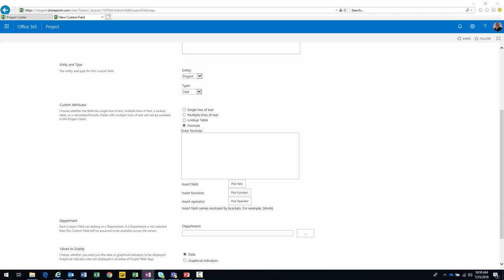And rather than you watching me type this, we're going to paste this in. Okay. All right. So let's talk about this formula, right? Notice what it does. It says if PRS _T, therefore it's evaluating that text field, if it equals 1, the task is complete. If PRS _T equals a 2, output it's on schedule. If it equals a 3, it is late. If it equals a 4, it's a future task, which means it shouldn't have started yet, right? So we're going to give that a white dash.